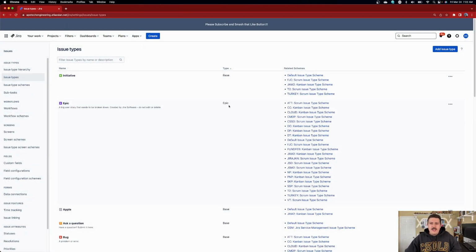Remember I was telling you a few seconds ago that you can't add other ones? You'll notice that the epic is a very, very special type of issue in Jira, at least today, as of this video. I do know that Atlassian is planning on updating the way their issue types and relationships work, so this may change in the future, but today, as of March 2023, you have to respect the fact that you can only have one and only one issue type that is of the type epic. You can rename the epic, not recommended, but that's really your only option. If you're trying to create a second type of epic or a third type of epic, it's just not going to be possible.